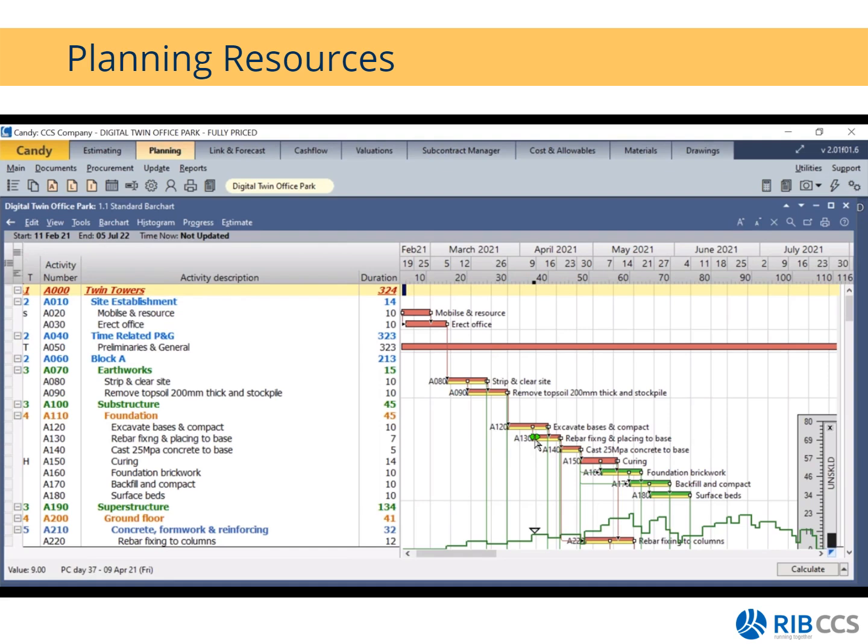But we put the option in your hands because, yeah, we don't really advise people to make use of resource leveling, but the option is there for you. You simply go to the front of the bar, so it ignores the links. If you go to the front of the bar, like I have it here, you will see the double-sided green arrow, and this will allow you to just move your bars accordingly.